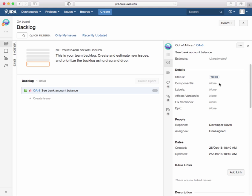The Fibonacci number series is appealing to us because it increases by not quite doubling. And that makes it really easy to pick between two alternative values for something. So we're going to be picking numbers from the Fibonacci number series, and we're going to be putting them into this estimate field.